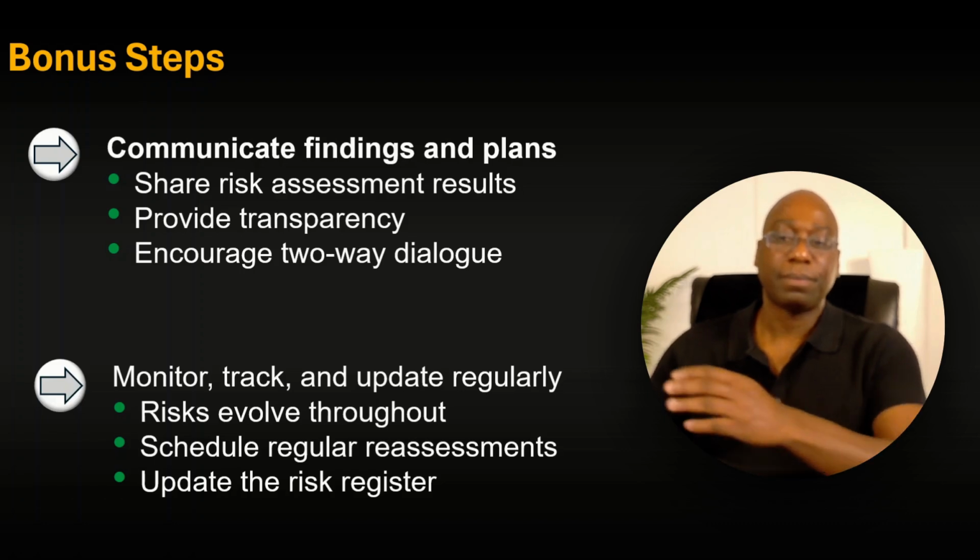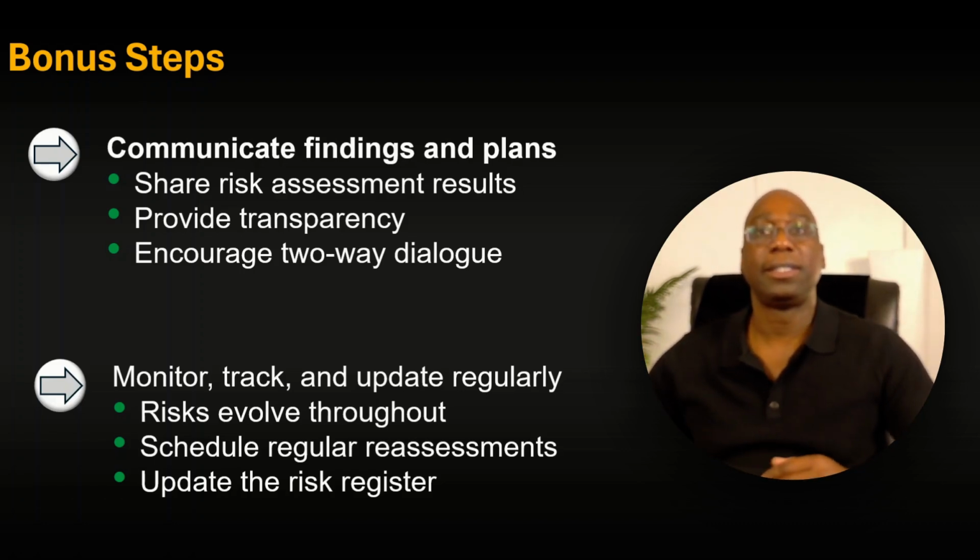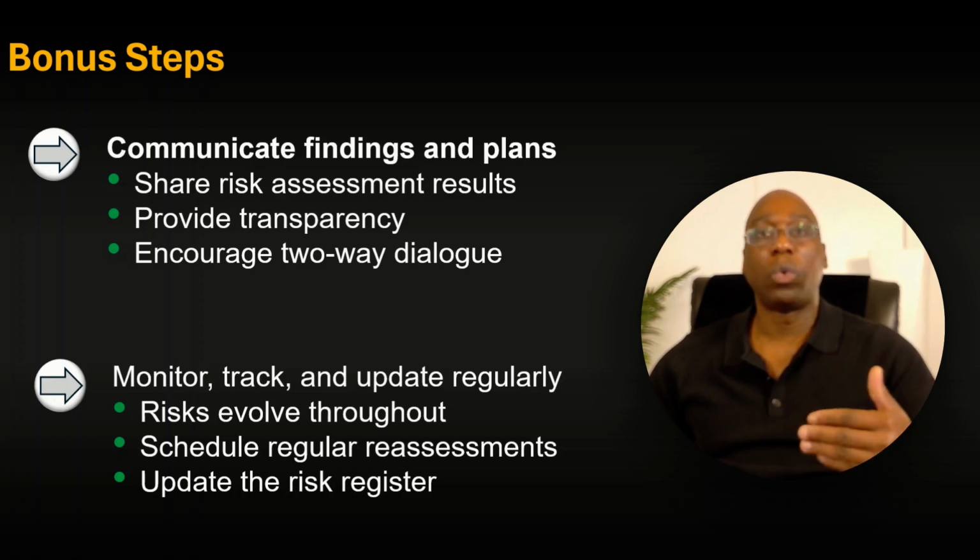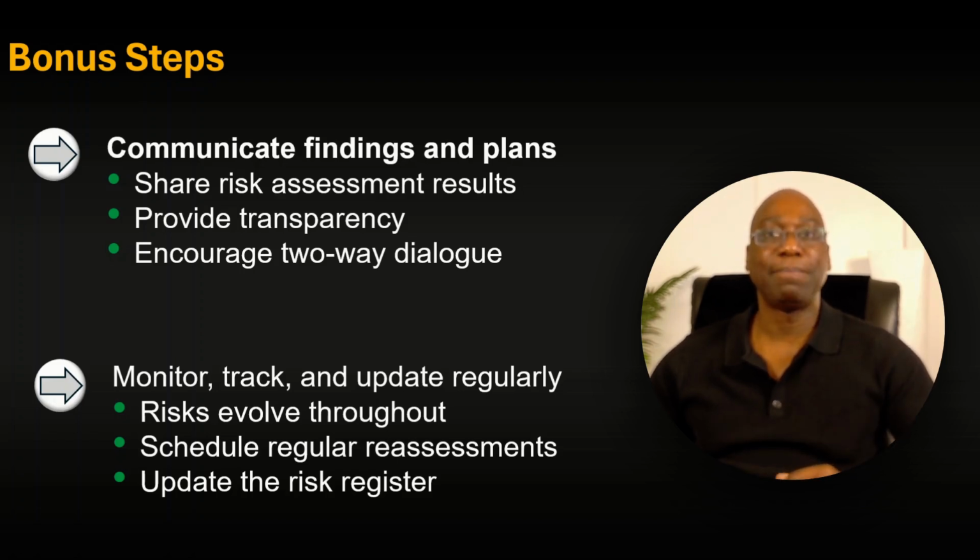For example, before pilot testing, before enterprise rollout, you can do follow-up updated assessments then. You also want to update your risk templates or register with new risks as well as lessons learned.